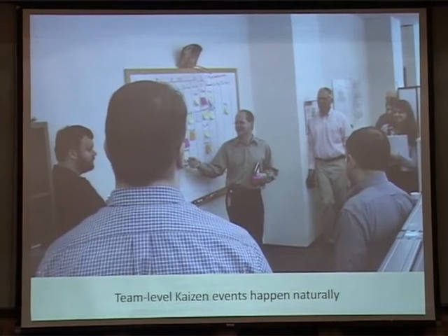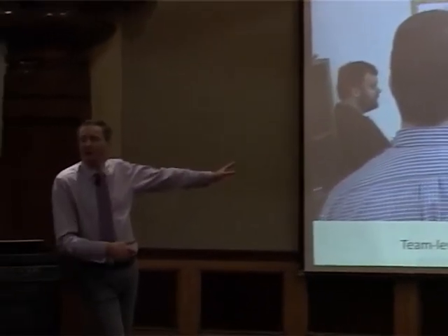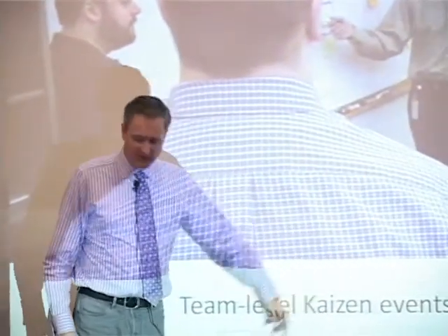And the after meeting is where they discuss the process problems they're observing. And they have discussion about what they could do about it, and they start making suggestions. And the Japanese word for this is Kaizen, an English event. Kaizen means continuous improvement, and the team is suggesting process changes. It could be as simple as adjusting a WIP limit or changing a policy, or it could be something much more elaborate like, it's about time we implemented continuous integration around here, and that will need a bigger plan to get it done. That's the bottom level feedback.